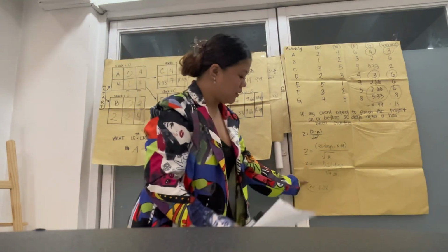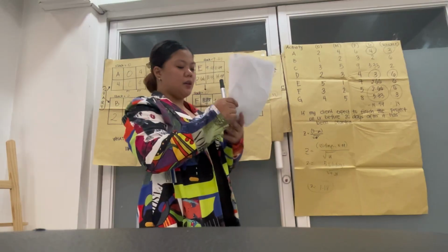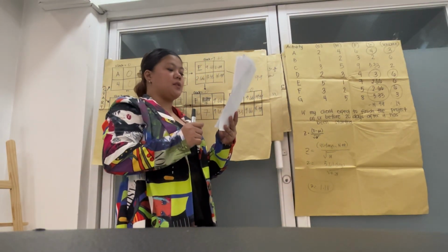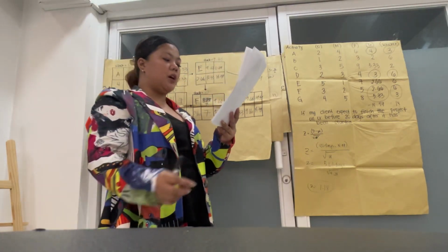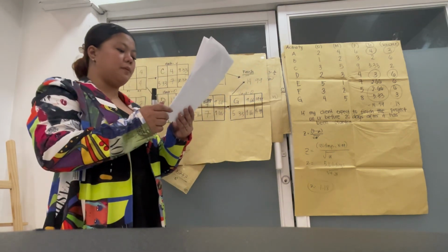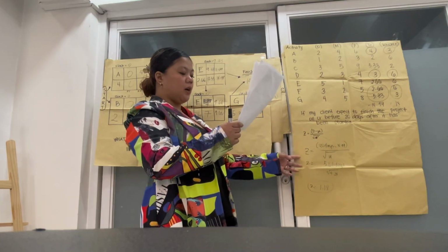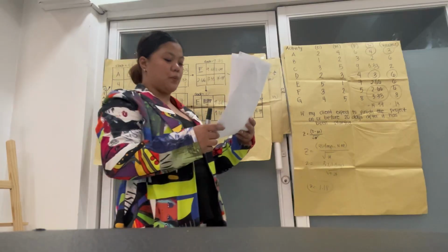So 1.18 gives 0.8810 probability based on a single tail normal probability distribution table. Therefore, the probability that the project can be completed in 20 days or less is 88.10%.